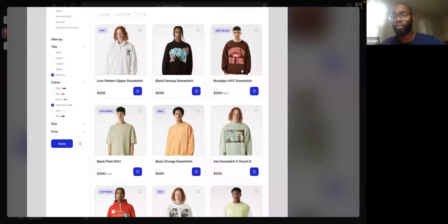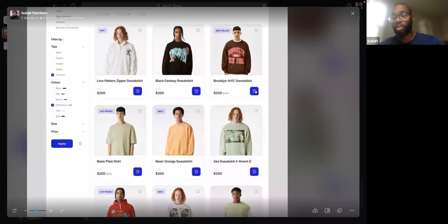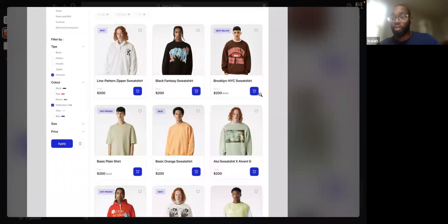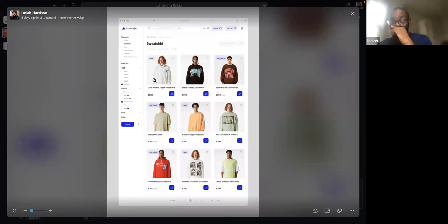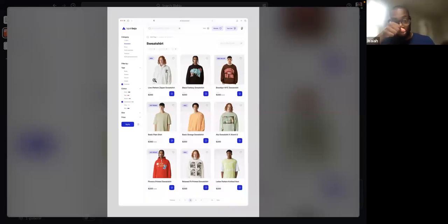I don't know. And then you create a ticket to make the button by itself. And you create a ticket to make this text by itself. And even this component here, passing in some text and using 2 components that are already created, that's how you want to break these down. You want to break them down into small pieces so that the level of complexity is always 1, 2, or 3 max. You don't want to have something that's going to take you more than 2 days to complete.